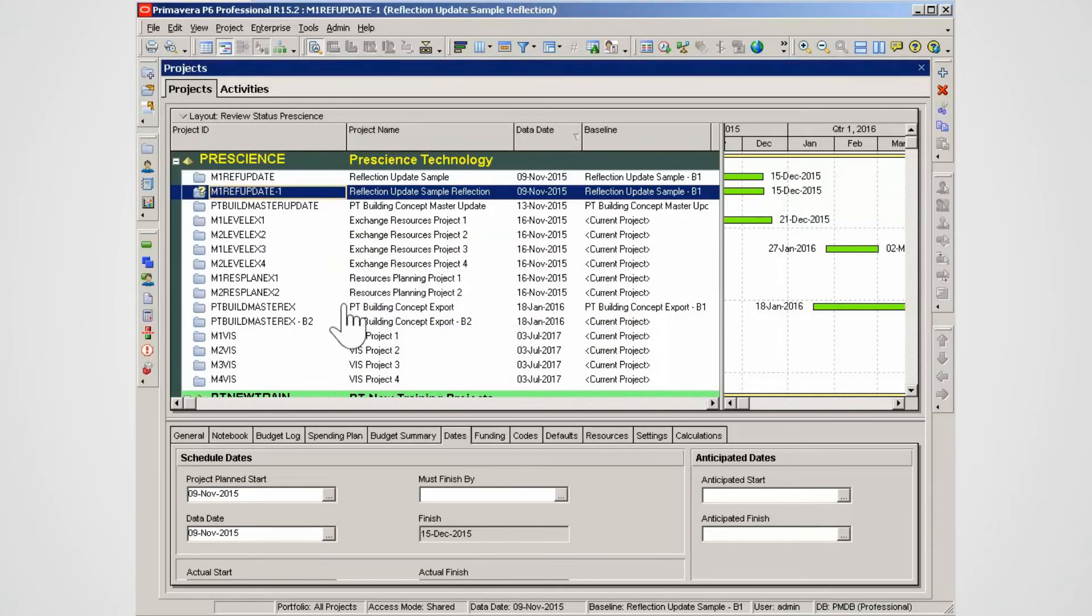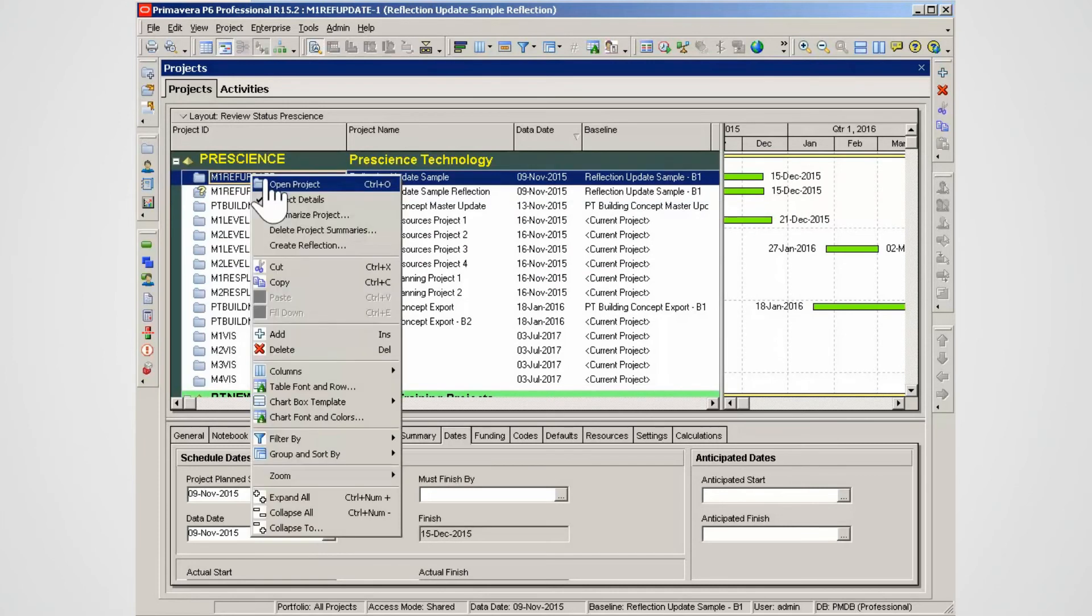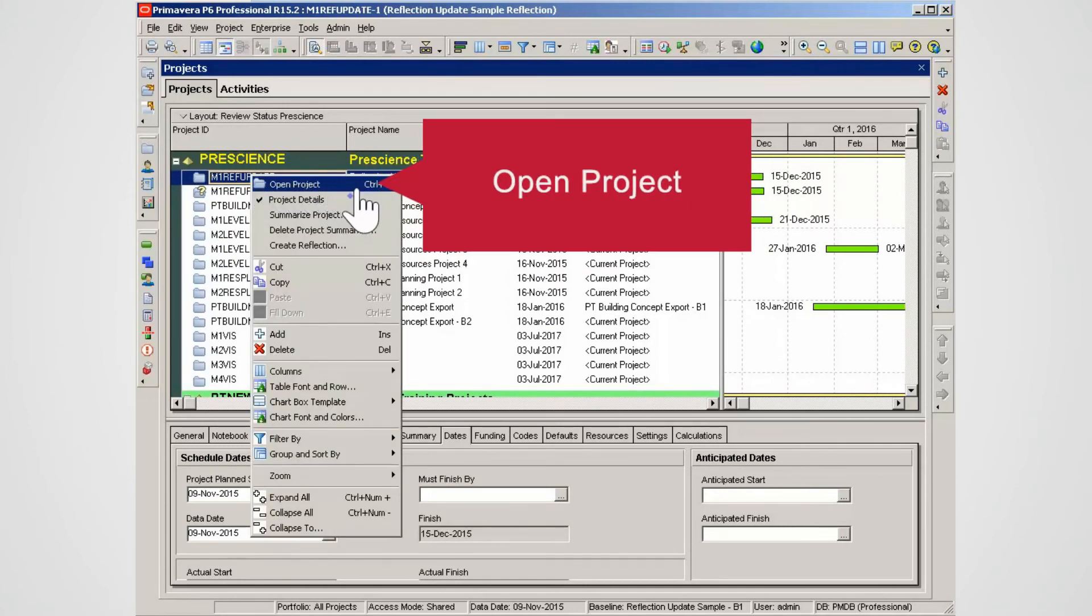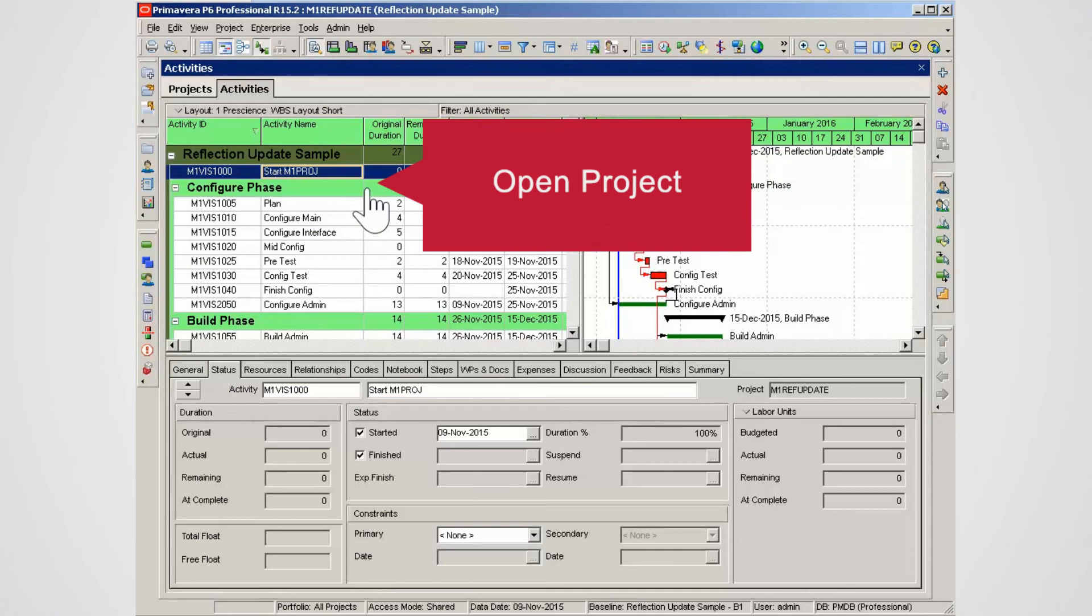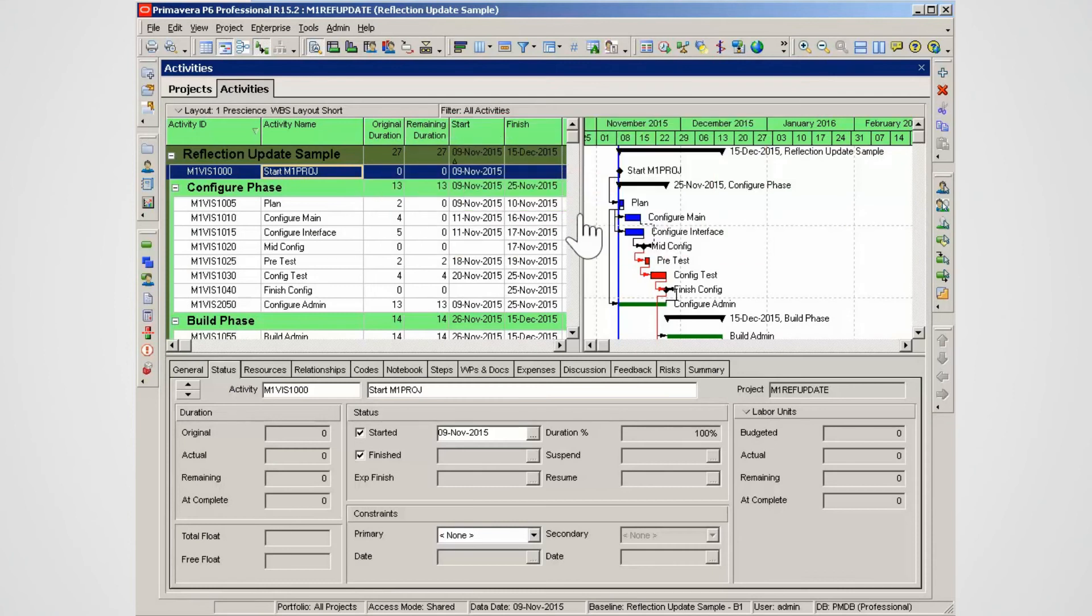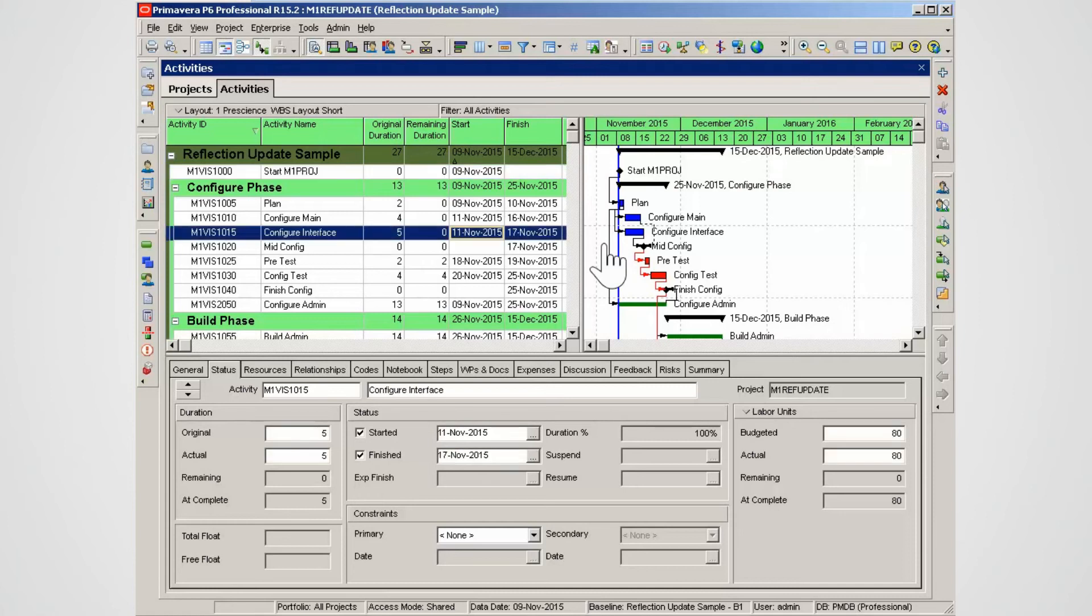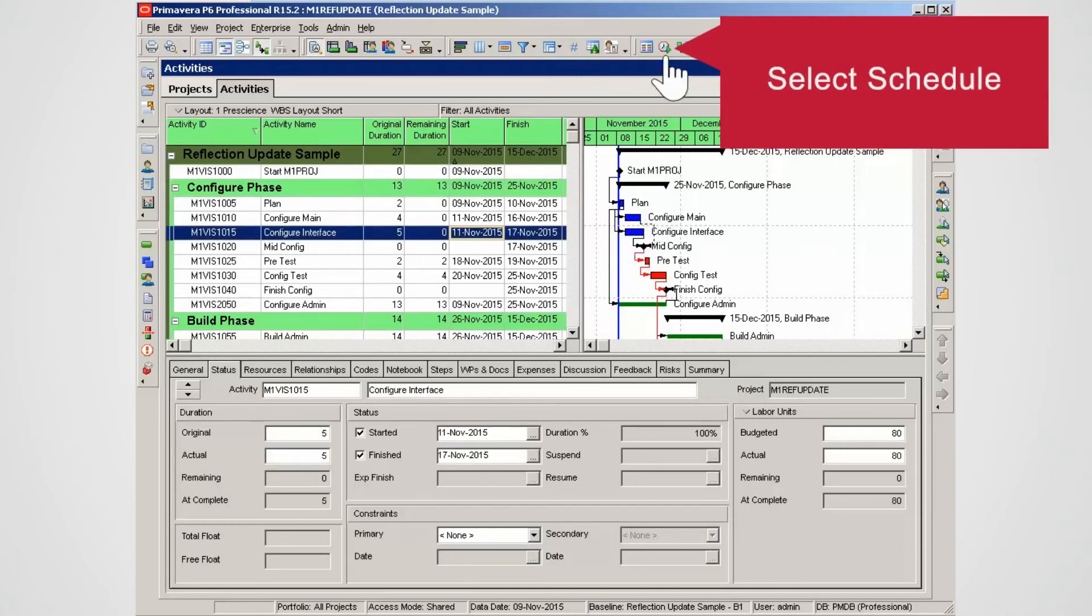To see the changes in the source project select the project. Right click and select open project. In the source project all of the updates from the reflection project have been added. The project needs to be scheduled to use the updates.